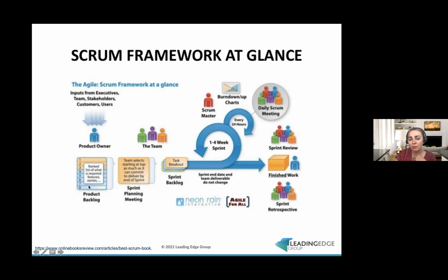And then from that backlog, during sprint planning the team pulls the stories they believe they can deliver in the upcoming sprint based on past history. Looking at the data on how much they delivered in past sprints, they are able to forecast what they can do in the following sprint.